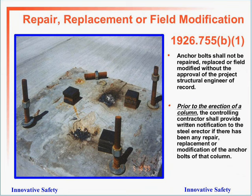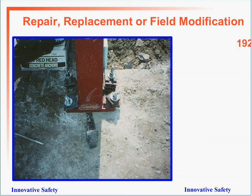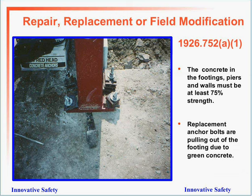Prior to the erection of a column, the controlling contractor shall provide written notification to the steel erector if there has been any repair, replacement, or modification of the anchor bolts of that column — because anchor bolts are put in when the concrete is poured, before the steel erector is even on site. The concrete in the footing, piers, and walls must be at least 75% cured. Green concrete — meaning under 75% cured — can result in movement or anchor bolts pulling out of the footing.